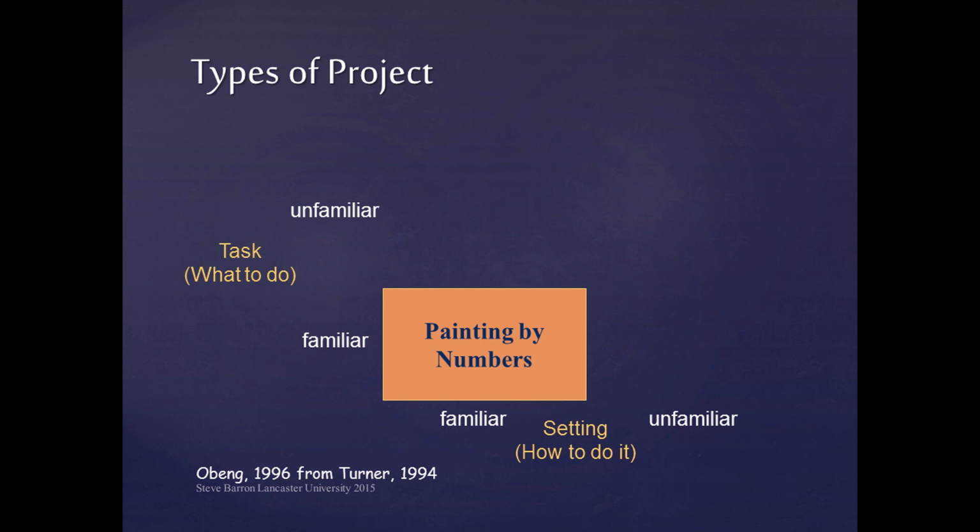This type of project is most like an operational activity because there is minimal uncertainty and limited risk. Management of this type of project is straightforward and can possibly be allocated to a novice project manager.